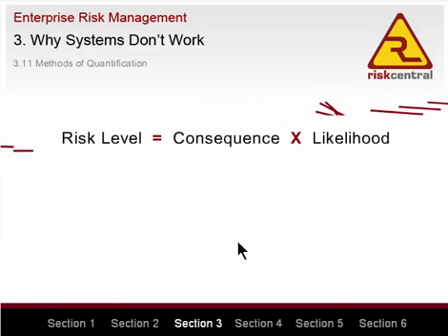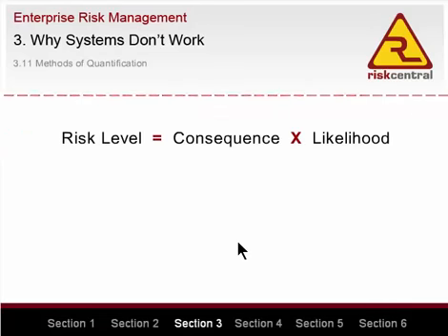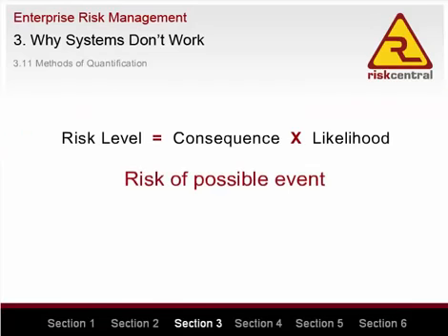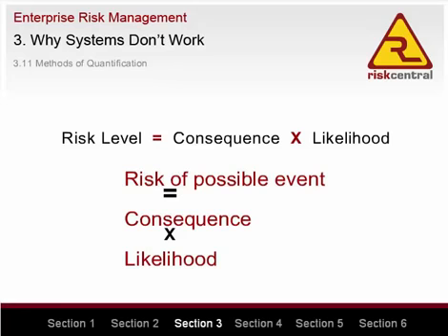Risk equals consequence times likelihood. Or the risk of a possible loss scenario equals the consequence of the scenario times the likelihood of the scenario. This is a natural mathematical equation and can be very easily proven. Be very skeptical of any system which does not use a form of this equation as the basis for risk quantification.